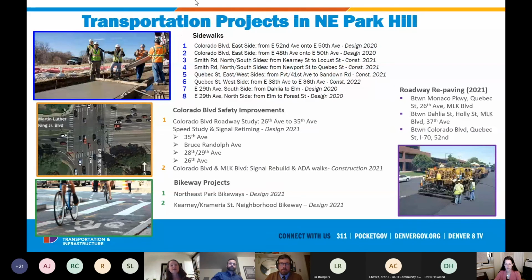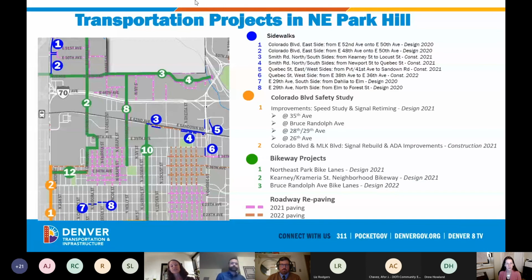paving is something that happens year over year. Our paving crews work to get almost the whole city repaved in less than a decade. Usually it's 5 or 6 years that we have repaved the whole city. So each year we're actually repaving 400 to 500 miles of roadway. That's a lot of roadway. And what it does is give us a unique opportunity to accomplish some other projects that just require restriping the roadway at the same time. That way we don't have to do expensive and destructive processes to remove old striping lines, and can put in new striping and new facilities at the same time as we do paving.